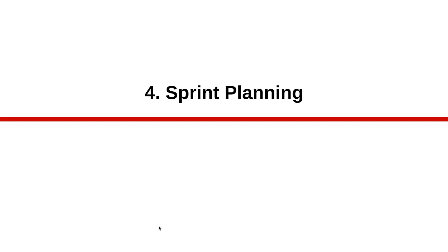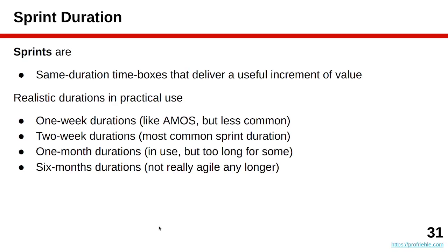All right, let's turn to the process of planning. Now that we have the basic tools, the product goal, the product and the product glossary, the product backlog and its content in place, we perform the work, as you know, in defined time boxes or iterations. In Scrum, they are called sprints. And all the sprints should have the same duration, even if sometimes during a given semester, because of some holiday or so, one sprint is longer than the others, which can always happen.